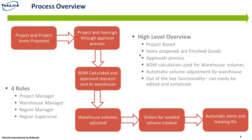For material maintenance, the process overview we're looking at today is an out-of-the-box functionality of a model that starts with a project or project item proposal. The project and project item will be proposed by the project manager, which will then be sent to the region manager to go through an approval process. The BOM will be calculated from the approved requests and then sent to the warehouse where the volumes will be adjusted automatically.